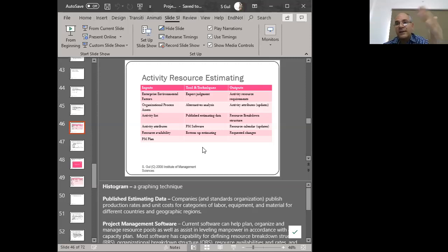Right? Now, normally the WBS is a decomposition. We're taking the project and breaking it down into smaller pieces. Then we're estimating the time and the cost and the resources at the smallest level, and adding upwards and upwards, and then providing the overall estimate of the cost, the time, etc. for the project, right?